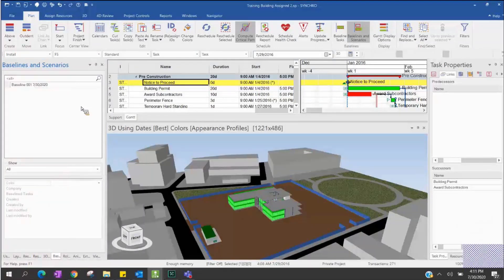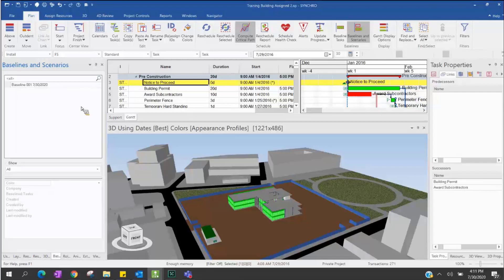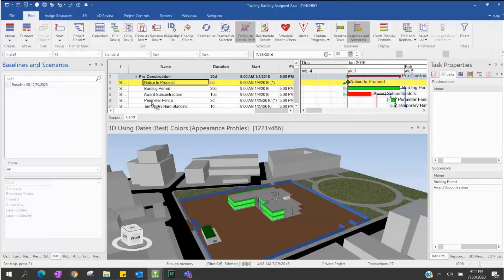Sometimes you will have many scenarios for your schedule — you want to try one approach, then change to a second scenario and take another baseline. So you can have multiple baselines.